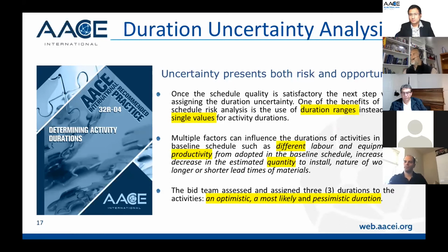So I think that one of the benefits of doing an SRA is that you can use duration ranges instead of using a single value for activity duration. So you give an opportunity to people in the project team to assess what is the potential impact in the schedule if we have a duration of 10 days instead of 15 days, or if the duration is now 20 days.